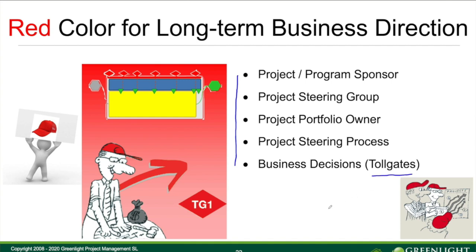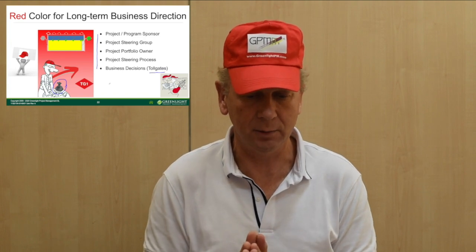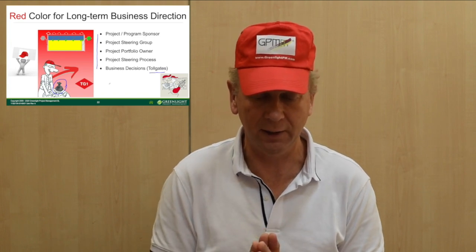We will see later on in the continuing course that we use toll gates to make decisions — go or no-go decisions. The red color is a lot about ensuring that we use money in the best possible way and that we create the most possible value in the projects that we do.